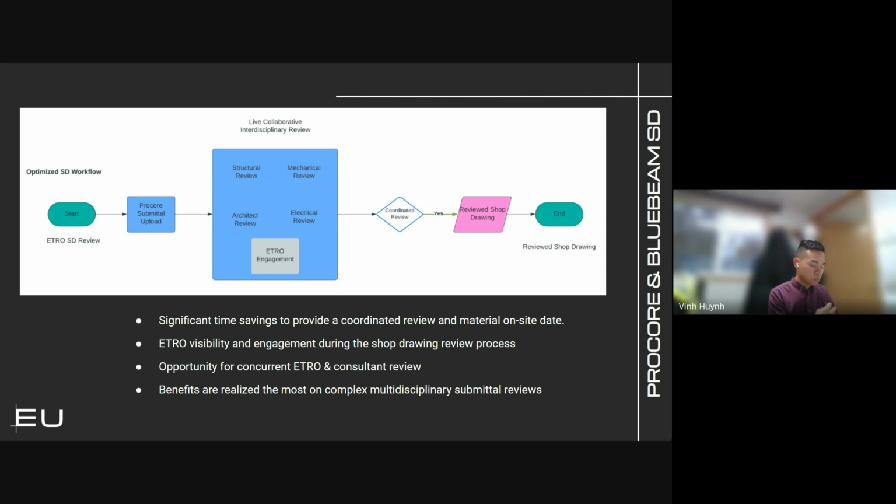And also, whenever we at ETRO receive a shop drawing, we just launch it on Bluebeam Studio. We don't become the bottleneck of the whole process, because a lot of times we receive a shop drawing but don't have time to review and stamp it before sending it to the consultant, and a lot of the time we become the bottleneck. So this eliminates that, which is good.